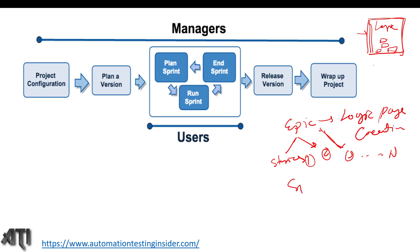Once issues are created, stories can be further divided into Tasks and Subtasks. For example, the user story for creation of username and password can be divided into tasks: one task for front-end development assigned to one developer, and another task for integration with the back end assigned to another developer. This is how we divide different tasks among team members.